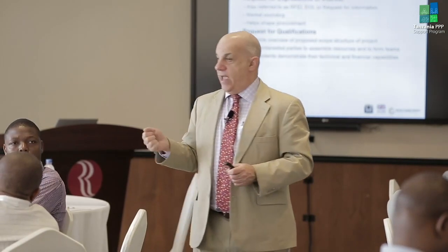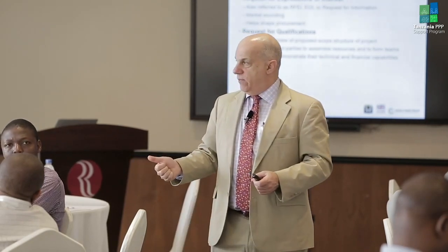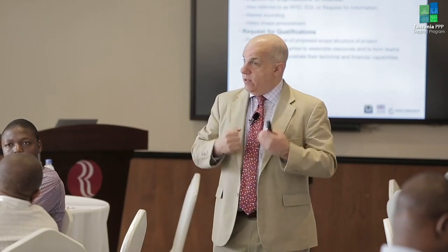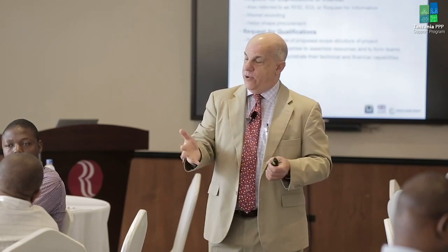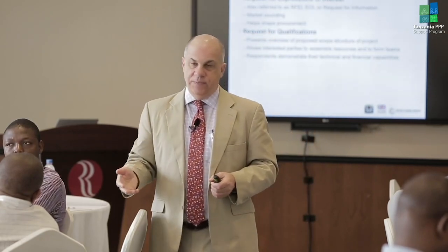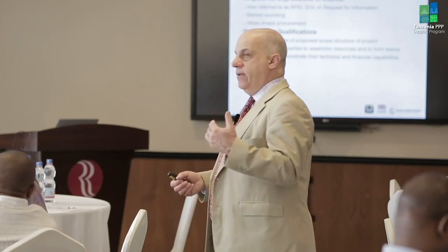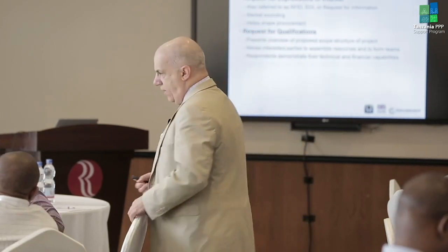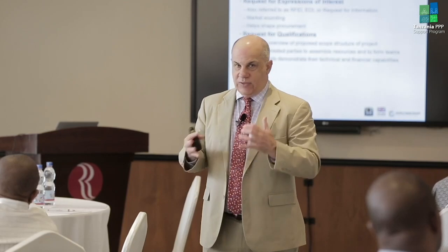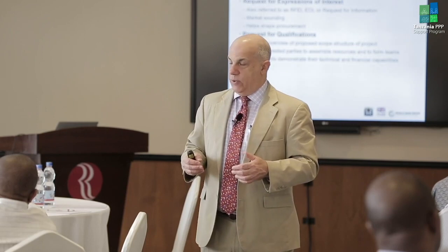A lot of that stuff they already have files on. You're not asking them to give you a proposal on what, let's stick with the bus terminal. You're not asking them to tell you how they're going to build the bus terminal or how they're going to finance the bus terminal. You're not doing any of that. You want to know, do they have experience in, say, building and operating bus terminals? Do they have access to financing to fund the project? This is really just that. Are they qualified to pursue this project?